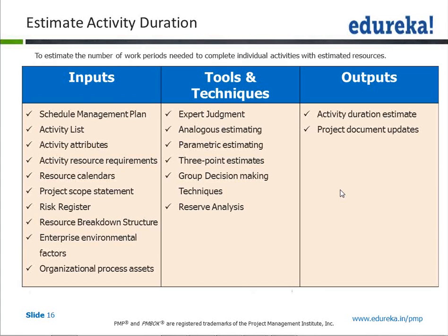One is that I know that in a similar situation earlier in a project, it took me around 8 days to 10 days for this Java per function point kind of an activity. Now if one function point takes 8 days, then 150 function points will take 150 into 8, so 1200 days. Now, how do you get that?